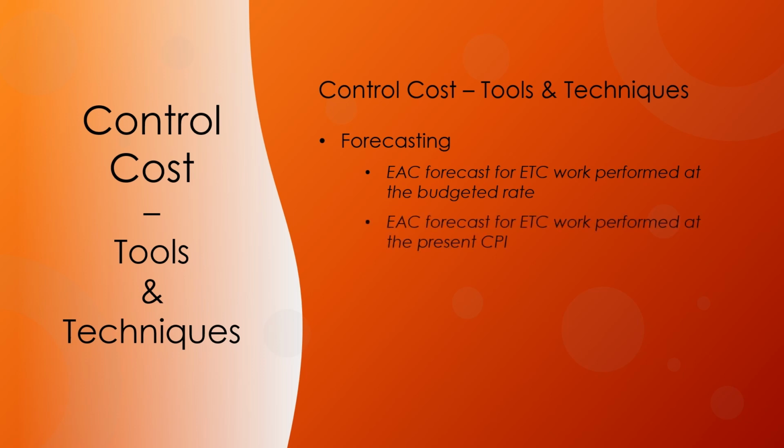This method assumes that what the project has experienced to date can be expected to continue in the future. The ETC work is assumed to be performed at the same cumulative cost performance index as that incurred by the project to date.